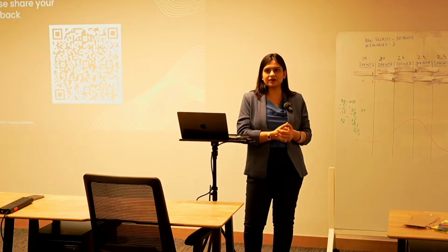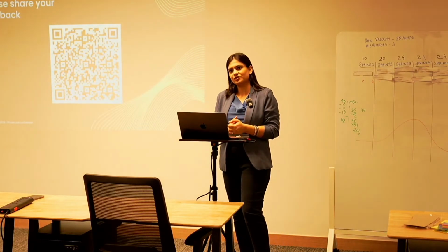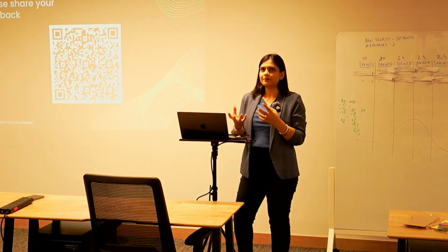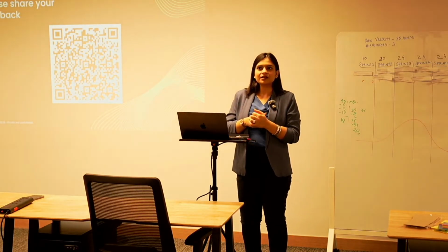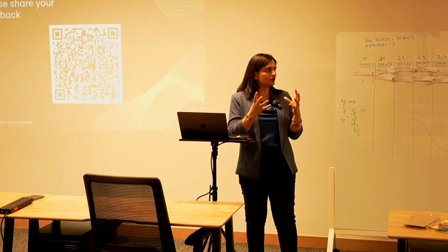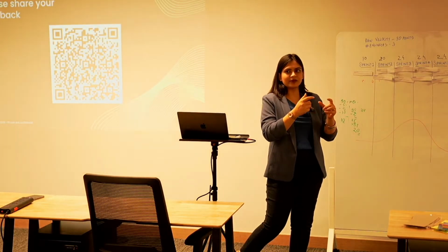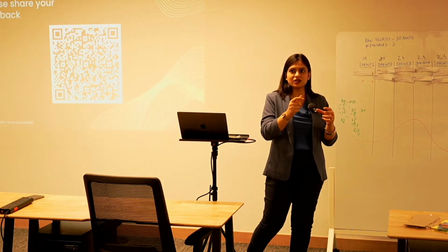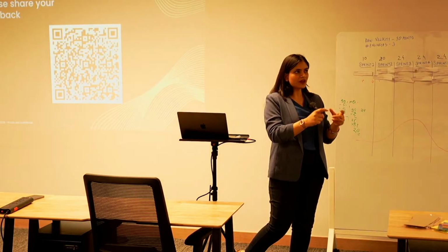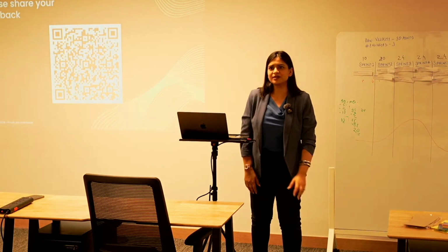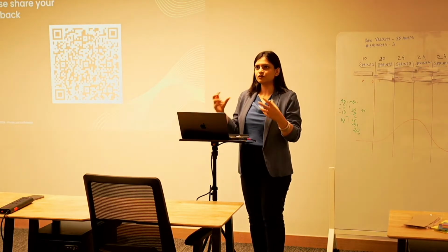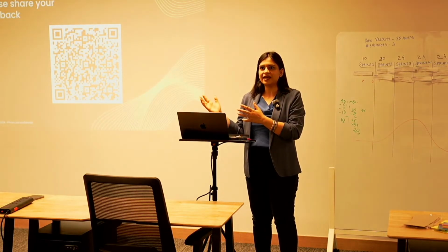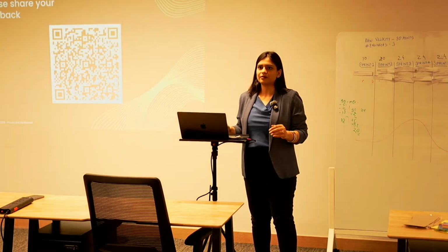And I feel like a lot of senior developers or engineers do understand that. But in case you might not have that baked into the efforts, then you also take a 10 or 20% additional buffer to track the testing efforts. But that's usually an anti-pattern, because that gives you the impression that testing only happens at the end, which is not something that we recommend at all.